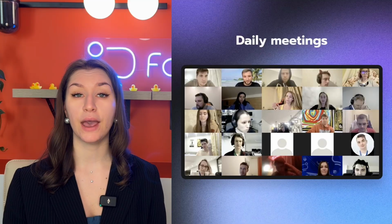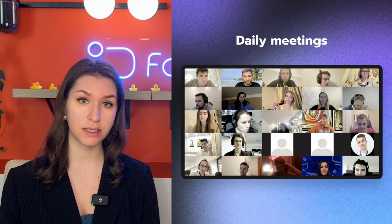Once development begins, each developer is assigned a specific task, and we move into daily stand-up meetings. Every morning, the team shares updates, plans, and any blockers. At the end of each week, your project manager sends you a status report, which summarizes what's been done, what's on the plan, and any questions or concerns to your attention.